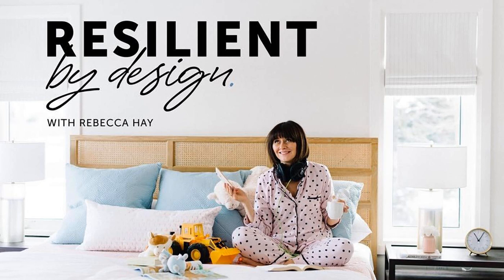Once you place those orders early, then you can get a really good sense of if you need to reselect, if anything is back ordered, and then you can very confidently say to your contractor and your client, okay, here's when we're expecting things. So we could probably start demo like September 21st, because by then the toilet will have arrived and we're good to go. I always say to my clients, I would rather delay starting the demolition or starting the construction